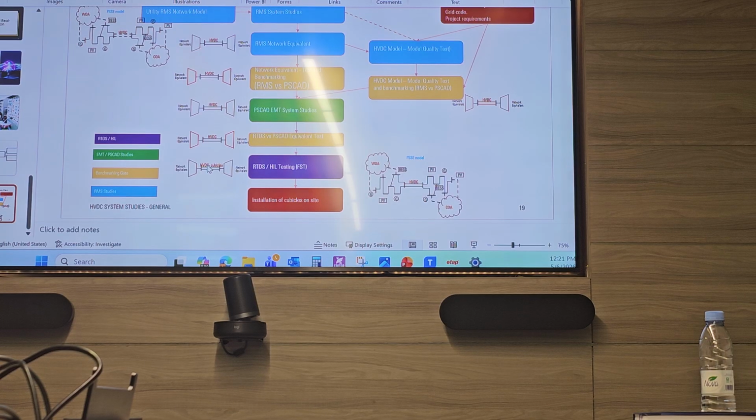Because when the project is about to be energized and you discover your rating of something is not good, or you will have an issue, or you will have to decrease power or something, it will cost you a lot. Because you will go to the contractor and say, okay, now urgently I need something else. If you do it urgently, it costs you maybe 2-3 times more than usual, because you need to energize. If you are late, for example, oil production will be late and someone will be angry, so studies are there. This is during project execution, but also during the maintenance period.